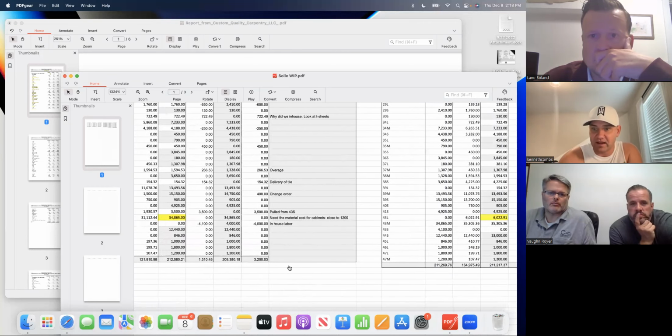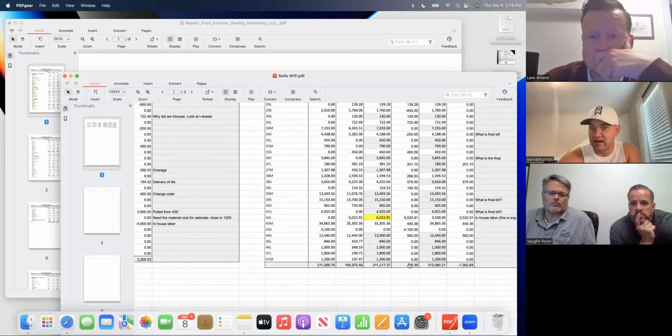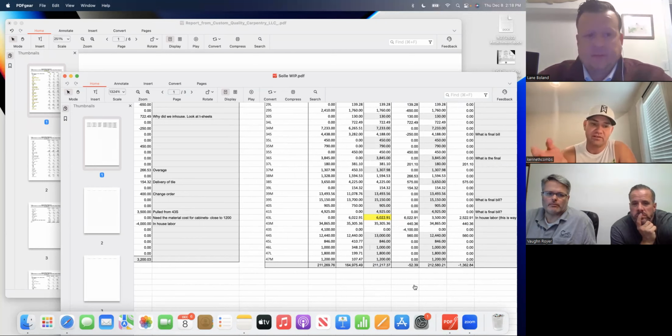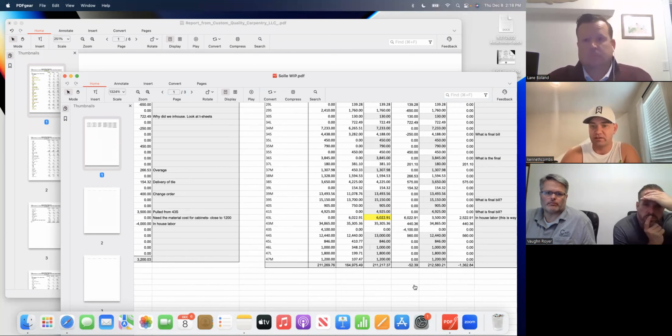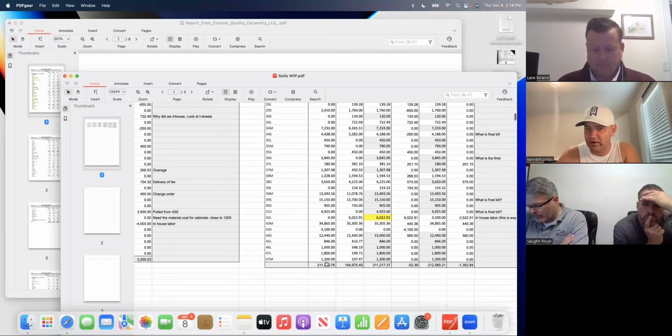When they did it this time and made their changes, now they're projecting we're actually going to have $52,000 of grippage. You want to be conservative early on and not say, well, demo looks like we're going to get done faster, so we're actually going to have some grippage there. It's better to just wait until you know for certain, and then put those numbers in and make the adjustments. So in this job, at this point, you can see it's almost done.